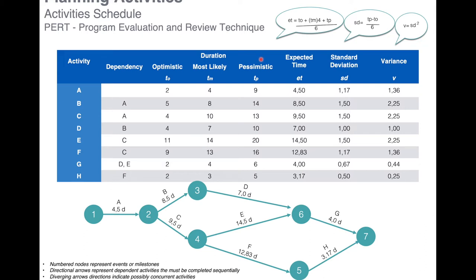For Activity A, the most likely duration is four days. From an optimistic perspective, this same activity can be performed in two days, and from a pessimistic point of view, we can perform it in nine days. So we have three possible durations for the same activity, and we do this for all activities in our project.